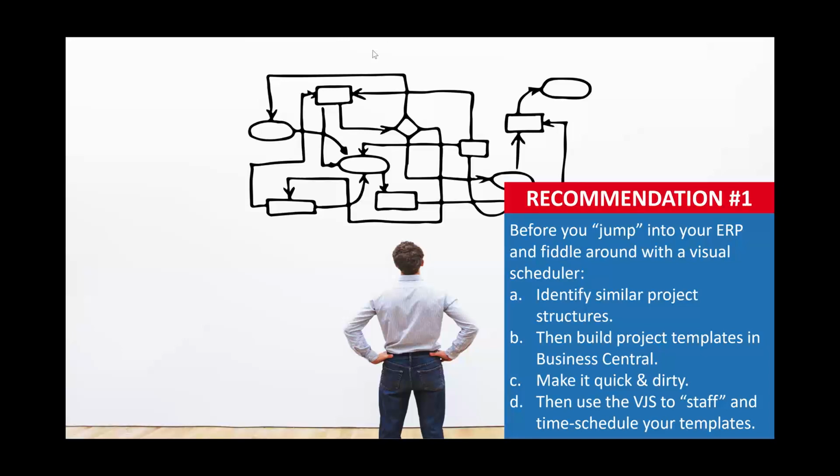And I really recommend that you take the time to look into all your projects and look out for these repeating patterns. If you identify them, write them down and then build project templates in Business Central. A template is a template. A template is never exactly what you will need in the end, but it gives you a head start, a structure, something to build upon and then customize for the project. So if you have this repeatable structure, set up project templates in Business Central.